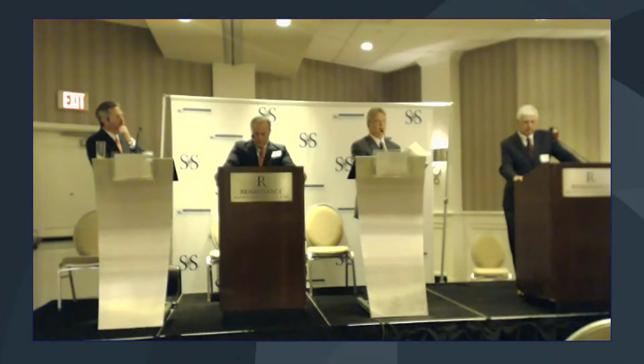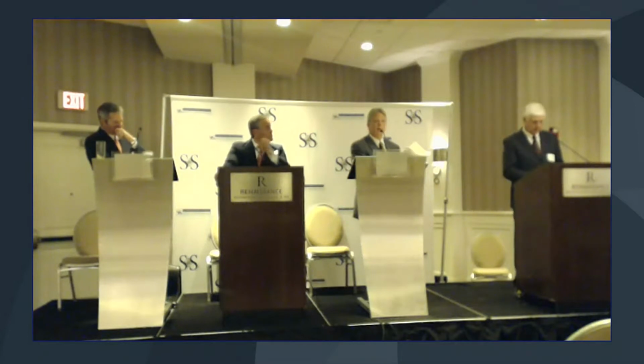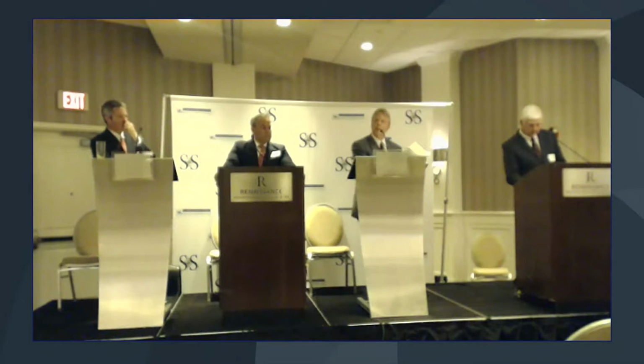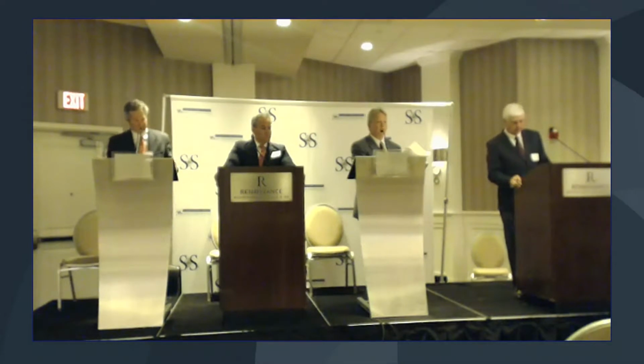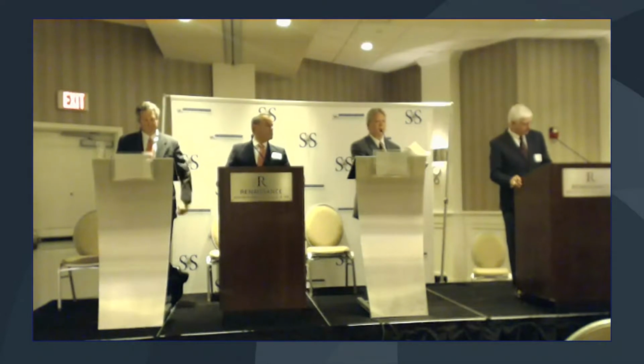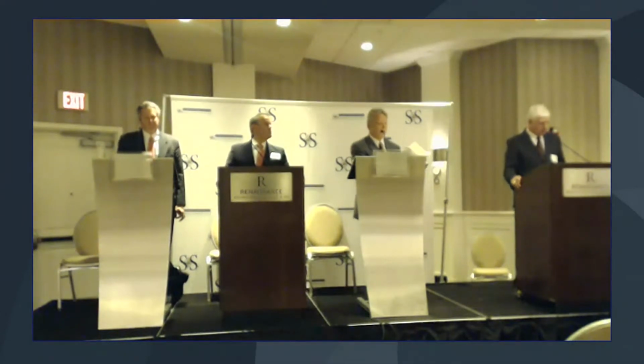So the SDI people will tell you that they jump in right away, that all that has to happen is that there has to be an estimate of a qualifying loss that can be calculated, and the SDI companies, insurers, claim that they step right in quickly and start writing checks. Therefore, they allow the general contractor, the holder of the policy, to make immediate decisions to get the job back going, to have more control, to be able to fund those decisions, and not to have to wait while the bonding company decides whether or not to challenge your decision to terminate the subcontractor. So that's a major emphasis of those who promote SDI.